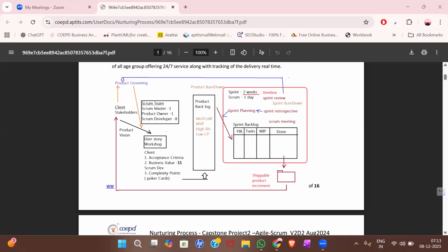There are hundreds of user stories for a product. For a software there will be hundreds and maybe thousands of user stories based on the size of the product. We don't know which one is high priority, which one is low priority, right? So BV tells us that the higher the BV value, the higher the priority of a user story. BV is nothing but business value, which tells us how important that user story is for the business in terms of financial value. So let's take our restaurant example.